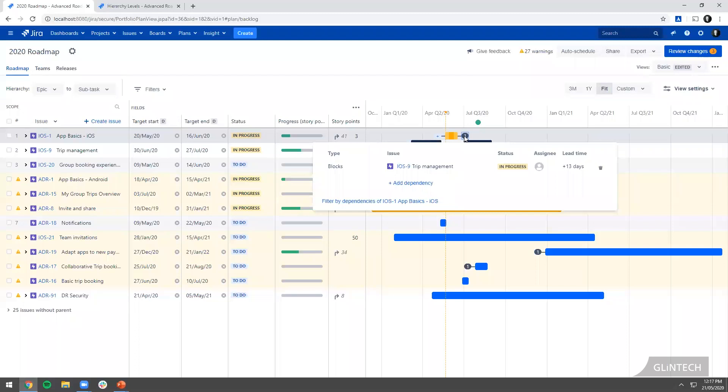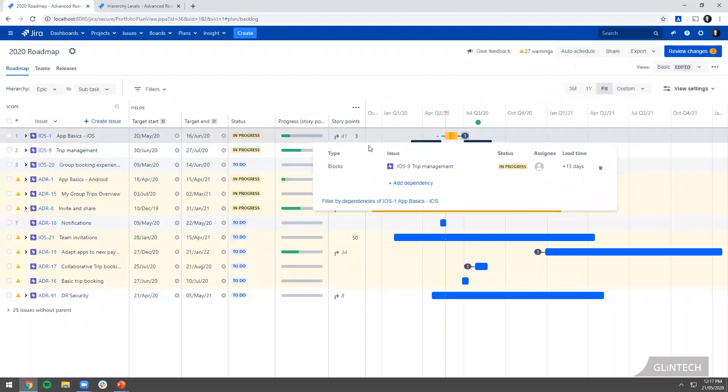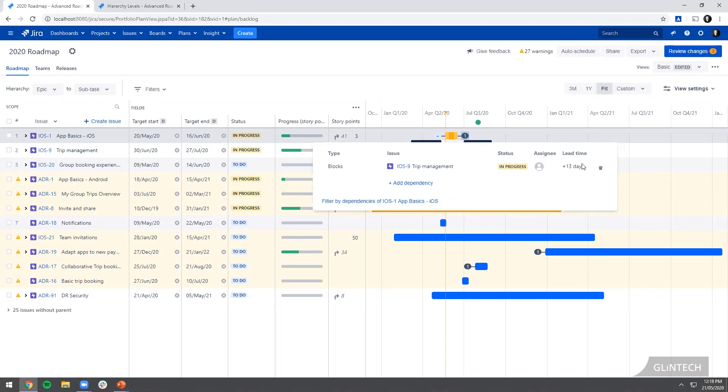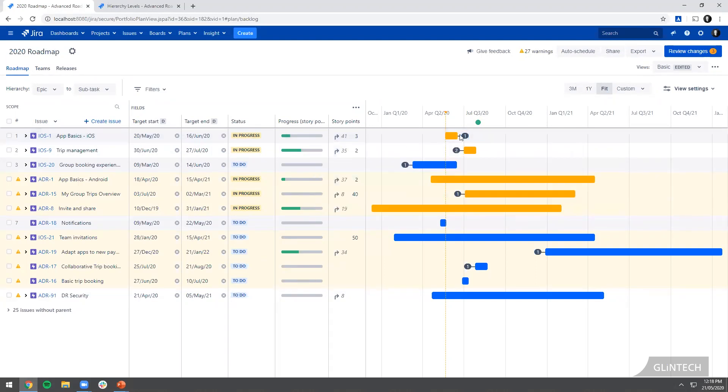What we can do here is have a look. I can see that this epic blocks iOS 9, which is one I'm doing. I can see the status of it, who the assignees are, and I've got a lead time of 13 days. That's good. That means I've got 13 days grace between when this one finishes and then iOS 9, which is the next one down here, starts.